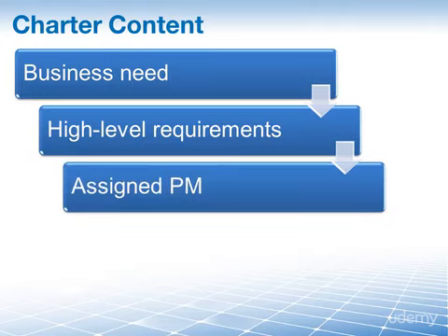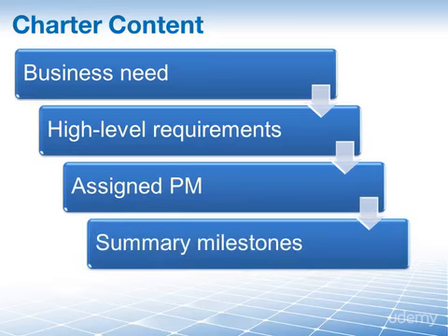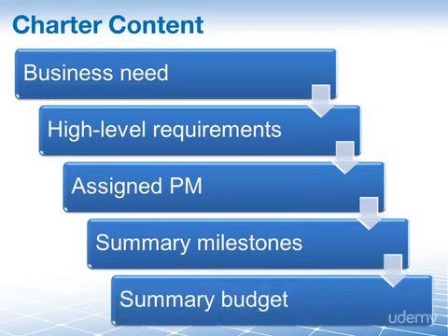Then there is the assigned project manager and what his or her authority is. That's important to remember because, as we have heard, the project manager should be assigned during this process. And let's not forget that we will also have a summary milestone schedule in there and also a summary budget.